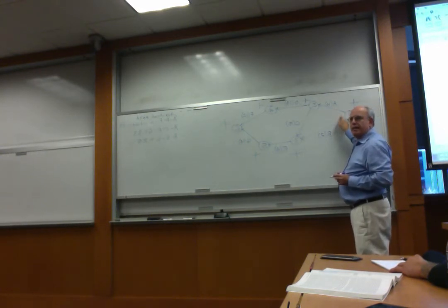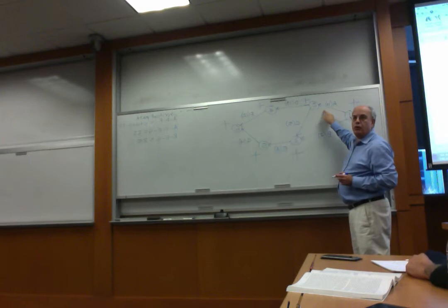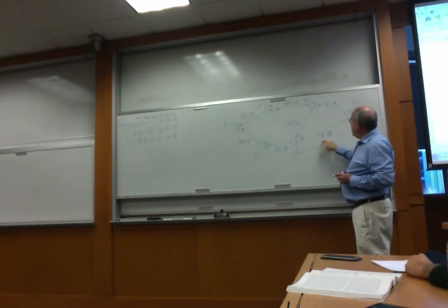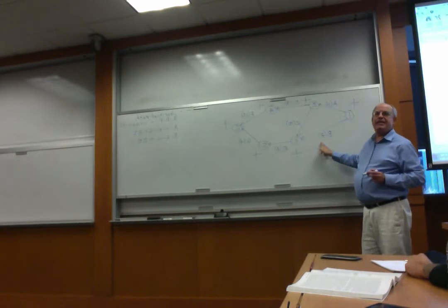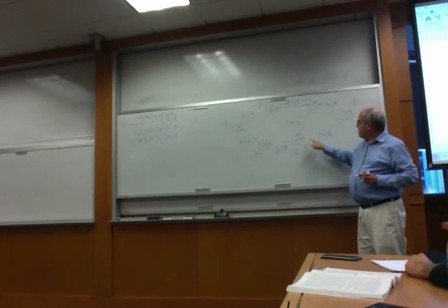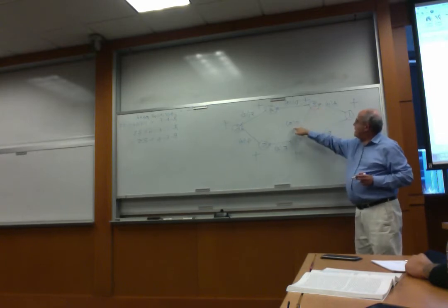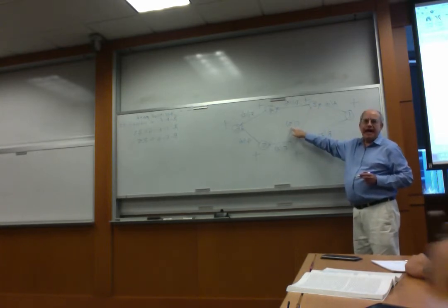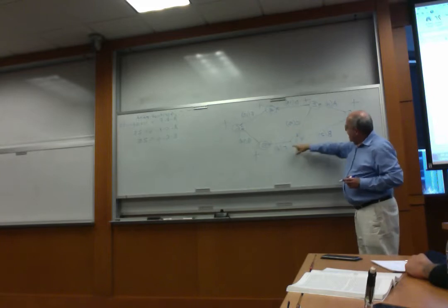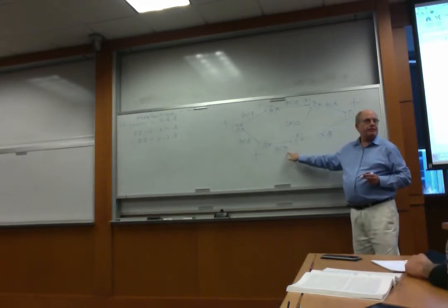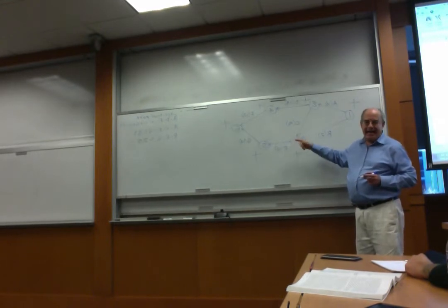Remember, at this point, we start both A and B. One crew works on A. It's going to take 10 hours to get there. Another crew works on B. It's going to take them 7 hours to get there. When A finishes, another crew starts working on C, 5 hours. So, when can we start E? Only when both B and C are finished.